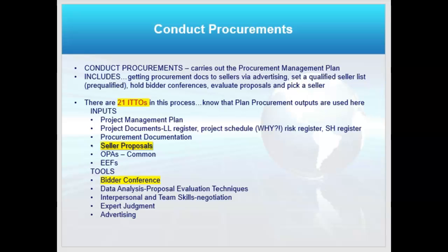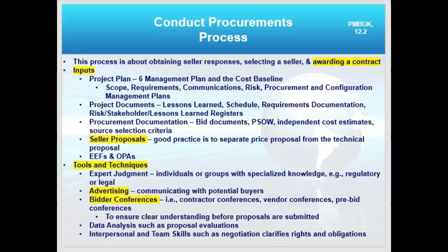Some of the tools I can use is to have a bidders conference. I can set up a conference, invite everybody that wants to attend. I can give a presentation, answer questions. That's a bidders conference. I don't have to do it. It's just a tool. I will do data analysis by evaluating the proposals as I wrote down in my procurement management plan. Okay. Now, the inputs continued. That's just kind of a bigger view with some extra notes there. And I can also advertise.